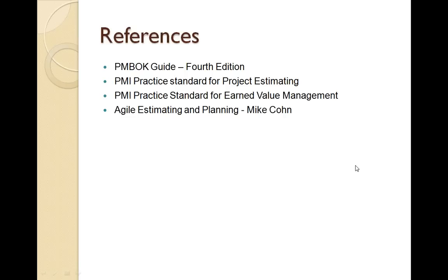But if we are following an SDLC method, then whenever we receive a change request, it goes through an approval process where the people who will implement it provide the estimate of the cost added or the extra effort required for implementing the requested change. Let's say I receive a change request and I say it will take 2 additional weeks. If that means I have to increase my project deadline or change my release date, or if the customer is willing to negotiate on taking some existing requirements out, then that decision has to be taken by a body called the change control board. The change control board will get your estimations for the change request, and based on that, further decisions will be taken.